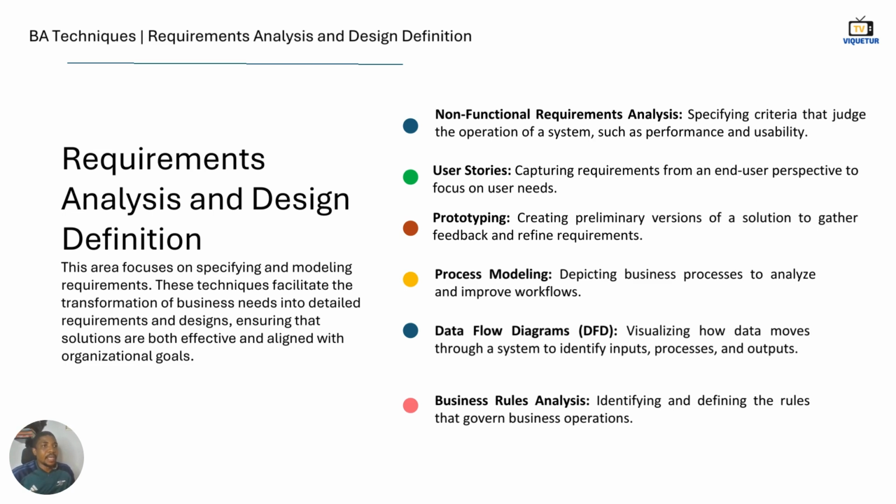I would say, as a user, so I define the actor. As a user, then I define the action. I want to enter my login details. Then you define the outcome, so that I can access my dashboard or my profile, right? It is this user story that I've written now. You see how simple it is? It is this user story that I will then take to my developer to say, guy, look at this user story, build it.